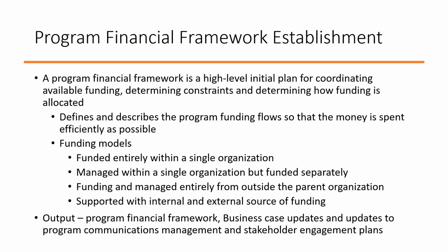Let us talk about program financial framework establishment. A program financial framework is a high level initial plan for coordinating available funding, determining the constraints, and determining how the funding is allocated. It is also going to define and describe the program funding flows so that money is spent as efficiently as possible. Essentially, the financial framework talks about how the funding is going to happen, and what the different models are in which we can source the funding.